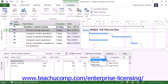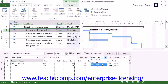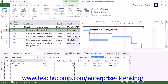Note that if you didn't want the addition of a second resource to decrease the duration of the task, you could choose Fixed Duration from the Task Type drop-down within the task form view, and then click OK to keep the duration fixed while decreasing the work hours attributed to each resource, changing the units of work for each resource on the task. You can also keep the work value fixed by choosing Fixed Work from the Task Type drop-down. This can often result in a durational decrease as well. If you simply do not wish to use effort-driven scheduling for a selected task, you can uncheck the Effort Driven checkbox.